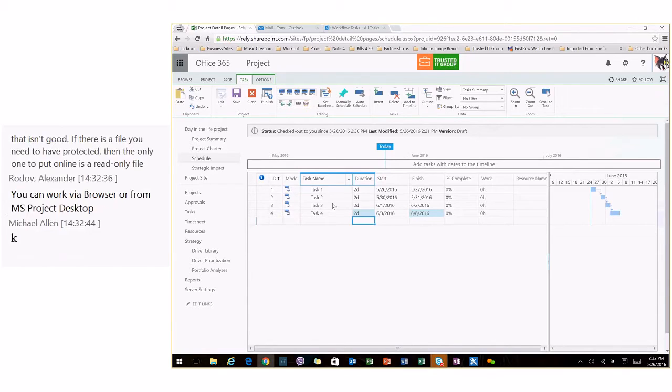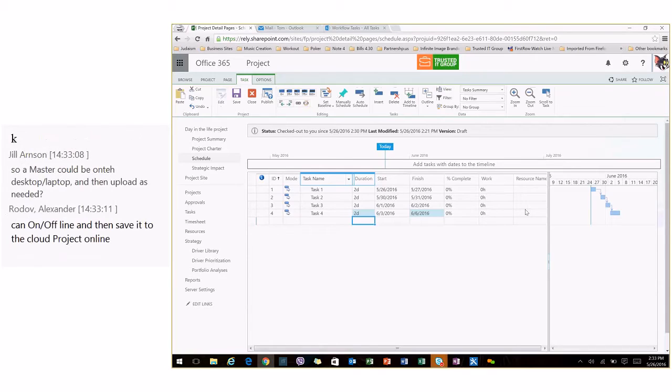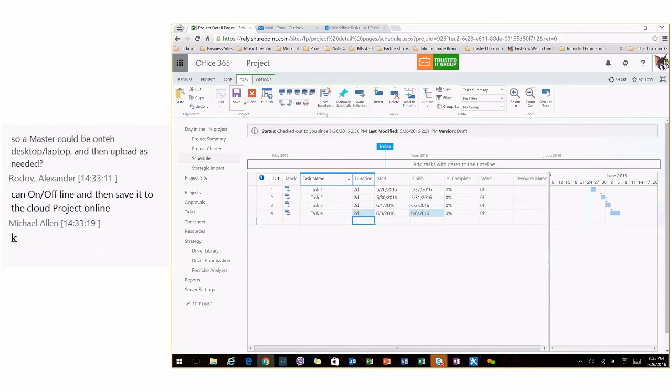So to give you that kind of flexibility, we can even take it one step further. You would even have the opportunity to create the schedule template with generic resources. The benefit of doing that, as you can imagine, is that you could then build your team based on those generic resources coded in your Active Directory. So we'll get to that in 1 second. Let's go ahead and save the schedule.